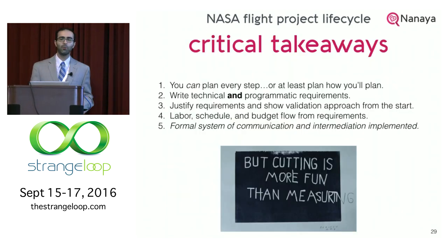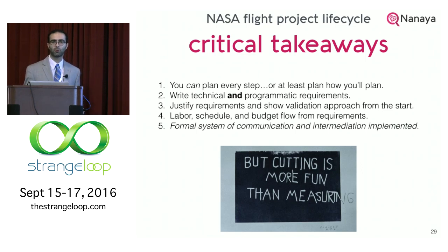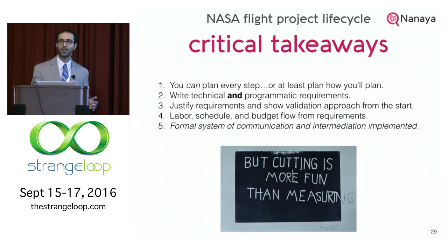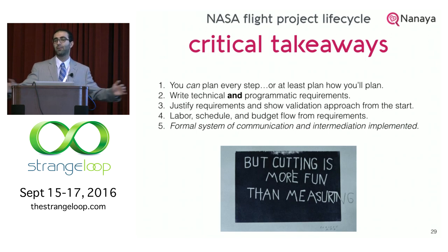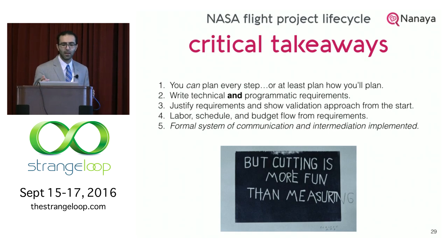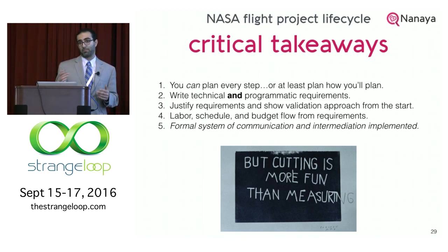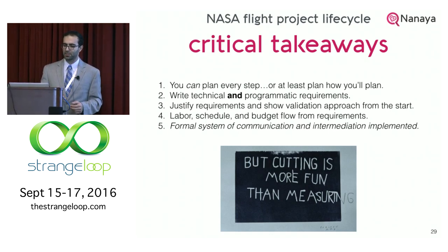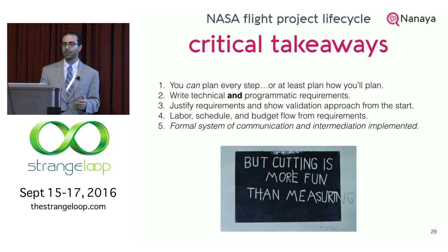Critical takeaways: you actually can plan every step. And even if you can't plan it exactly, you can at least plan how you will plan it. A part of doing that is writing technical and programmatic requirements — not just technical things, but how the entire team will work together. Make sure there is a consistent set of goals and language everyone is using. Justify requirements so there's a reason they're there. Also, have a way to make sure what you're building can actually be tested — I've seen a system where requirements were written but there was no good way of testing them, it didn't pass reviews, and was sent back into development. From all these requirements and vetting them, you can get labor, schedule, and budget that end up being very accurate. A formal system of communication is essential so everyone uses the same language.